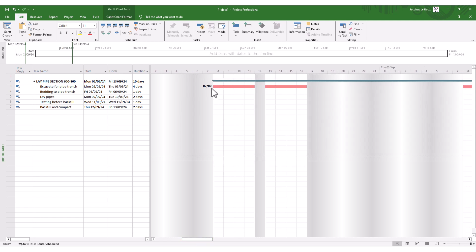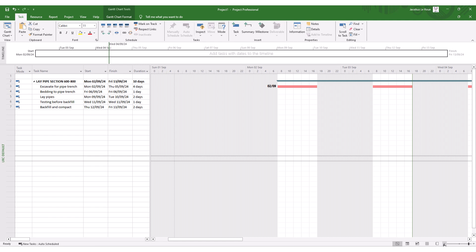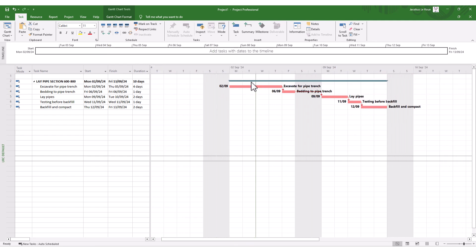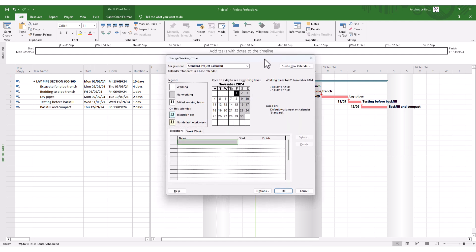So why do we get decimals? Firstly, it's when there's a mismatch between those project options settings and the calendar settings. If you right-click and go to Change Working Time, or go to the Project tab and select Change Working Time, this is where you can tweak the calendar you're working on and change the default working times — and this is typically where the problem starts.